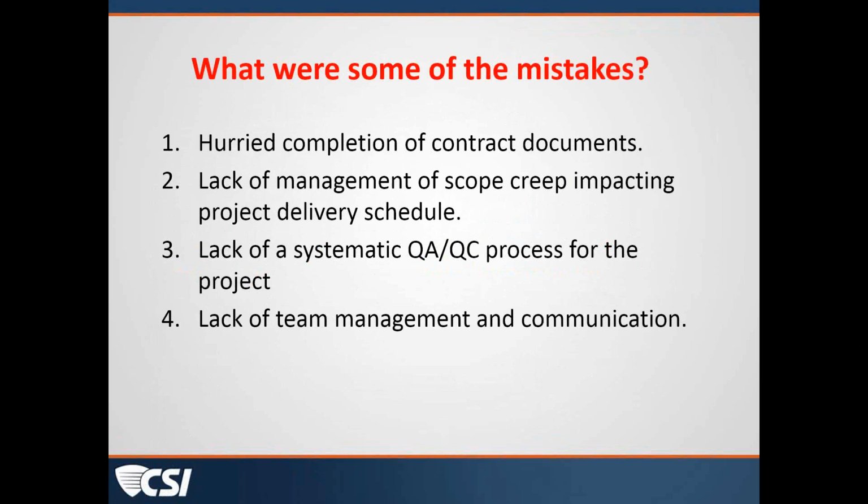And that is another good reason for pre-qualifying contractors. There you go. I'm a big proponent of pre-qualifying contractors so that you're getting a contractor that has the experience and the knowledge to work on the particulars for that project that you're working on. And a contractor that's building multifamily housing on the coast is going to have different experiences and a different knowledge base than a contractor that's building high-rises in downtown Houston. There you go. That's a great point.